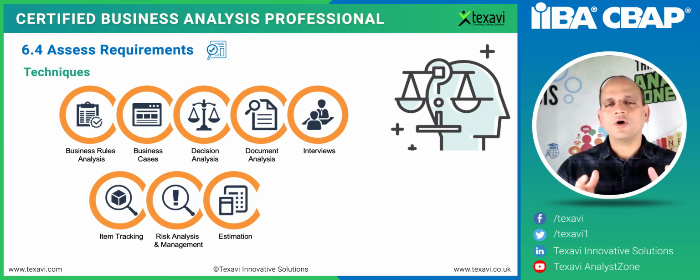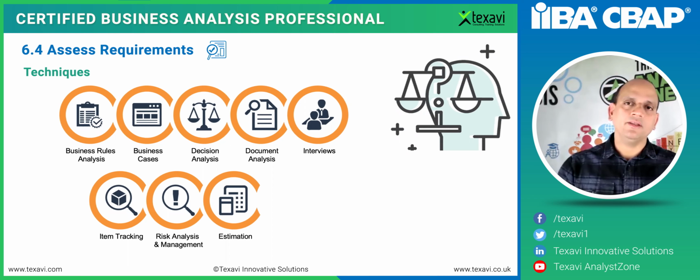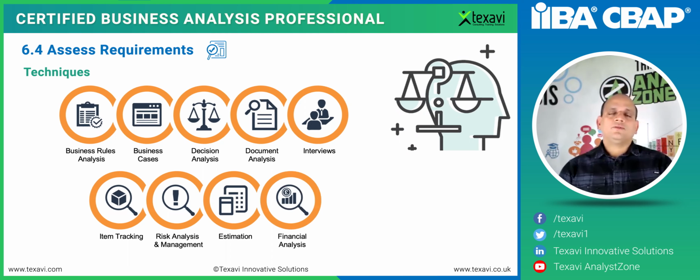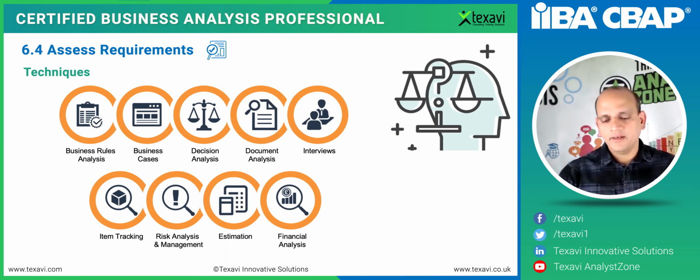And then take stock of that, and then kind of hit the pause button, and then try and look at what is required for us to incorporate the change in the requirements or in the overall product design and the process design. So financial analysis, again, to understand the financial impact of that, the investment aspect of it, if it requires significant budgets, what is the impact on the cash flow? Is it going to have an impact on the payback? Is it going to delay the payback further down the line, the discounted cash flows and things like that? All of that, again, needs to be studied, and so we could deploy the financial analysis technique as well.